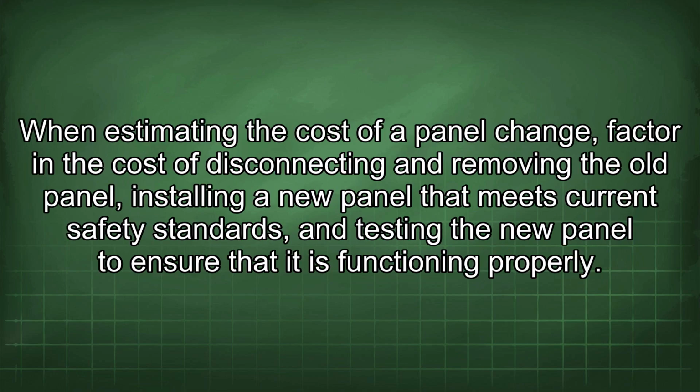When estimating the cost of a panel change, factor in the cost of disconnecting and removing the old panel, installing a new panel that meets current safety standards, and testing the new panel to ensure that it is functioning properly.